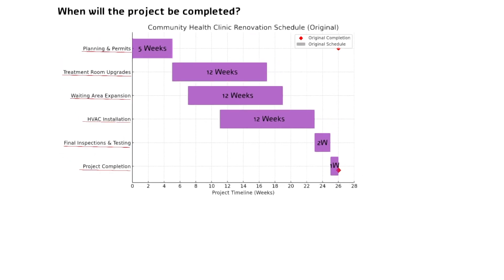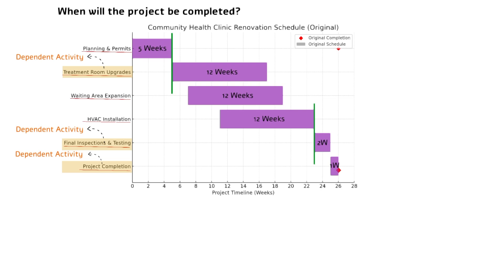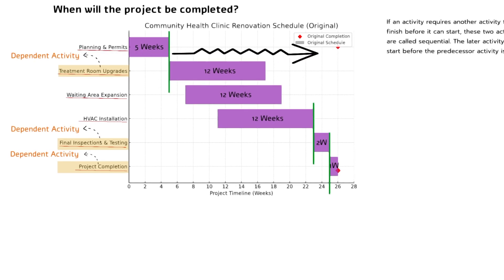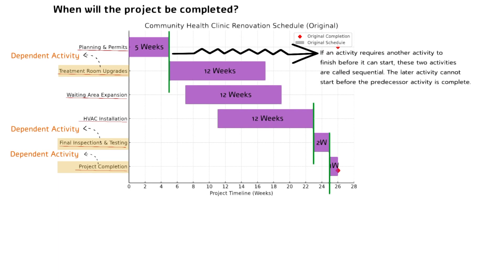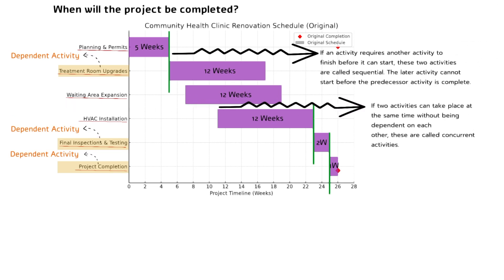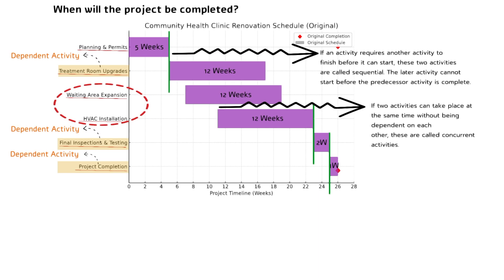When we get back to our chart, we see that treatment room upgrades is a dependent activity — it depends on the planning and permits process to be completed and cannot start before that. Similarly, final inspections and testing has to wait for HVAC installation to get completed, and project completion has to wait for final inspections and testing to be done. So these three activities are dependent on another activity. If an activity requires another to finish before it can start, these are called sequential activities. If two activities can take place at the same time without being dependent on each other, these are called concurrent activities. For example, waiting area expansion and HVAC installation are concurrent activities.